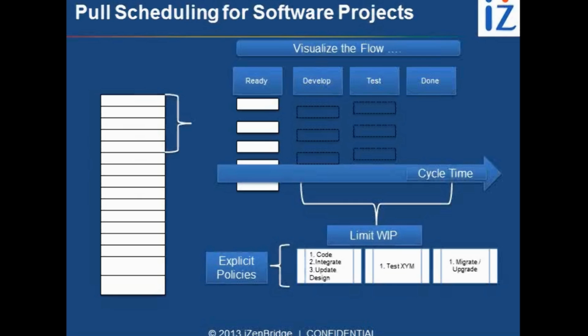So we don't have a sequence identified, because we understand how these items have to be worked on. We pick something and we move them through a defined workflow. If I'm talking about software development, you can think that you have a list of requirements, and in a given duration, you pick one requirement or a set of requirements depending upon your capacity. For example, if you have 3 developers, you can pick 3 requirements just to simplify. And then you work on analysis, design, development, testing only for those 3 requirements and finish them. As you are done, you pick the next slot.